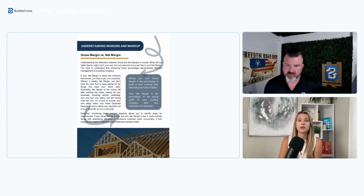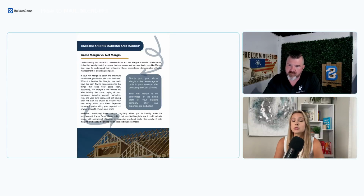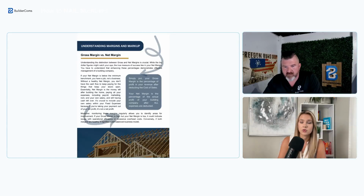And a lot of people think this is insane. How can you do that? For smaller projects, you absolutely can do that. For bigger projects, it gets a little more complicated, especially when you work with banks and stuff. But your markup should be determined by how much money you need to make and what is your percentage of overhead. Those two things are what your markup consists of.